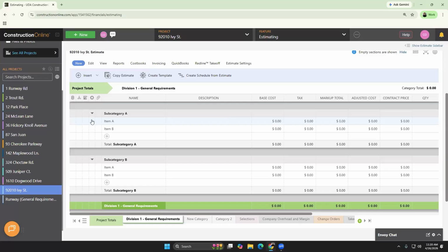You also have the ability to go through and apply classifications to line items, whether that's labor, material, subcontractor, equipment, other, or even if it's unclassified. And you can even apply classification based markup so that different types of work are priced at the appropriate margin. We're going to get more into markup in just a little bit, but there's a couple other basic tools that we can look at when it comes to line items.